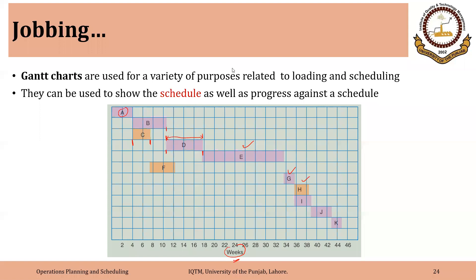You can also see that some activities can be performed in parallel. For example, activity F can at least partially be performed in parallel with activity D. So the Gantt chart shows not only the time required for each activity and the start and end times, but also the relationships — whether there is a sequential dependency or whether two activities can run in parallel. This is a very important and useful tool, and you can draw it in different software including Excel or project management software.